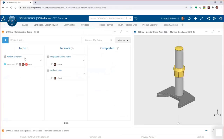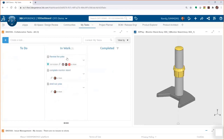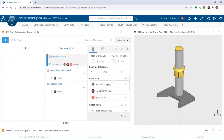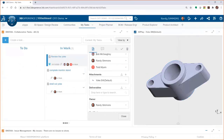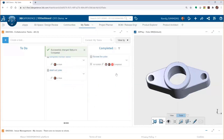Working in the cloud, you can assign tasks to yourself or to others. The platform notifies team members of task status as they progress from in-work to completion. Dragging a task from To Do to In Work notifies the assigner that you've started. A key benefit is that models, documents, images, and other data can be attached to tasks so the assignee doesn't have to spend time searching for that data. When complete, the assignee can attach deliverables for review, then move the task to Complete status.